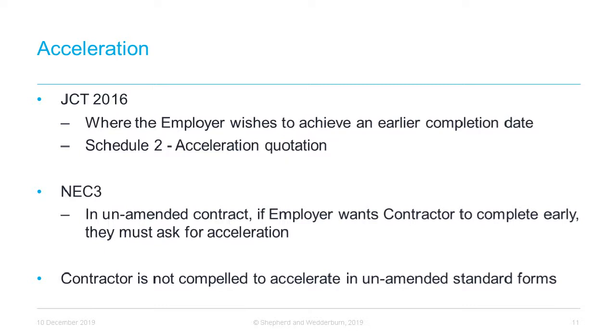Contractors may, however, be liable for liquidated damages if the completion date is not going to be met without the benefit of a time compensation event. When NEC contracts are amended and move away from the NEC principles, there are times where acceleration can be forced on the contractor. In those circumstances, a better way of thinking about acceleration is as a compensation event.